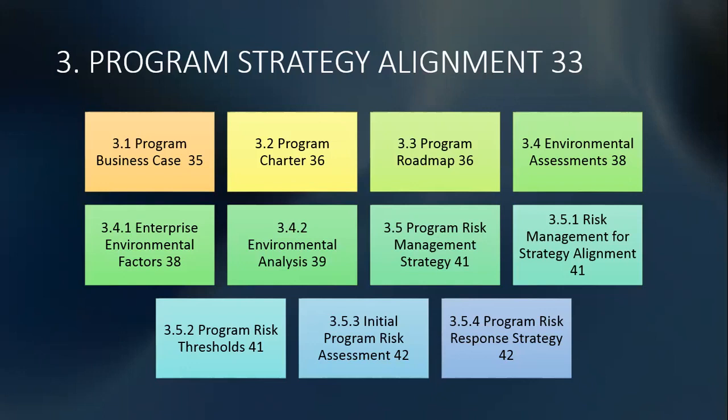Now, the business case that we're talking about here could include details about the program outcomes, approved concept, issues, high-level risk and opportunity assessment, key assumptions, and so on. Talking about the program charter, key elements of a program charter consist of program scope, assumptions, constraints, high-level risks to the program, high-level benefits from the program, goals and objectives, success factors, timing, key stakeholders, and other provisions very similar to your lineup in your project charter.